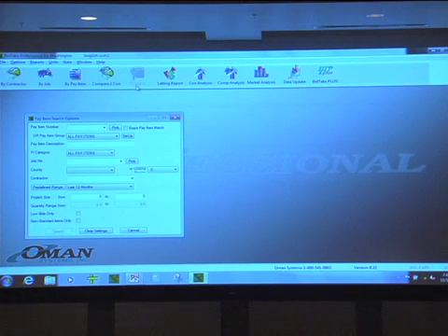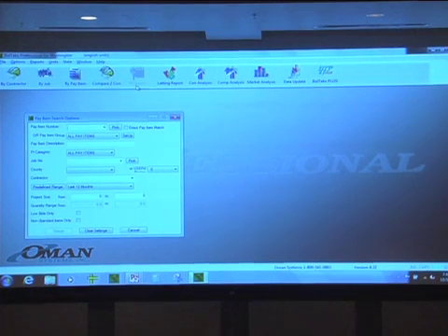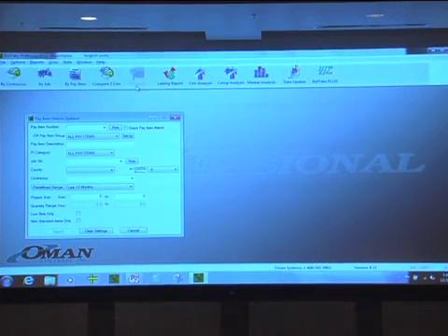And even if your non-standard item was used years ago, you can use your construction cost index to bring that up to today's dollars, and then you don't have to start from scratch, because I really hate starting from scratch. This is also great for finding those items that we use all the time, but for some reason, we can never get them in the spec book, or it takes forever. Like high visibility fence we had in Washington, we used it in every project, but it would never go in the spec book, and it took forever to get it in as a standard item. And we still have one of those today, and it's called shoulder finishing most of the time.